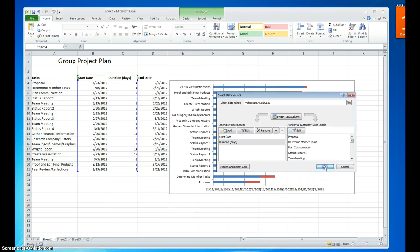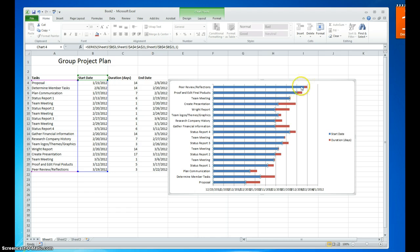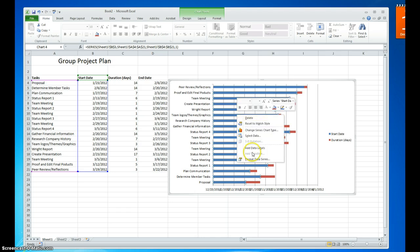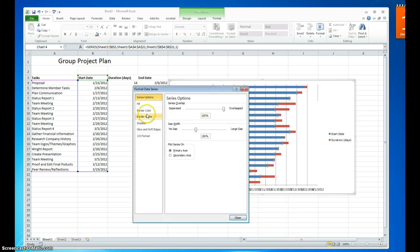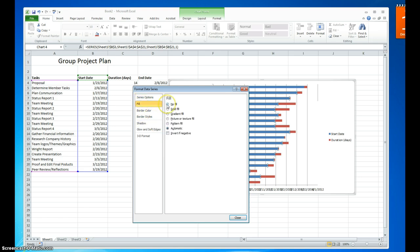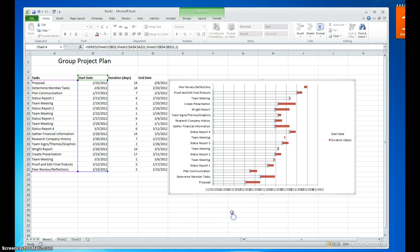Now I'm going to select OK. Then I'll select the data for the start date and go to Format Data Series. We are going to change the fill to No Fill and the border to No Border, then close that.